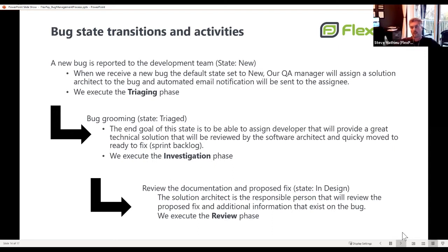What we do when the bugs wait, there are two concepts there. We're using a bug cap, which defines the maximum number of bugs we want to keep in the backlog to keep it in a healthy state. But to get there, we need to know the list of bugs, know what to do with them, and their impact. So we do what we call bug grooming. That's a concept most people understand and do.